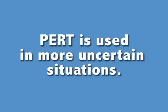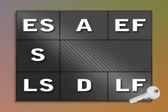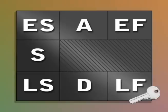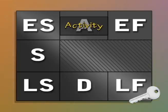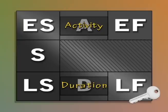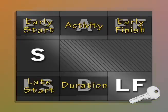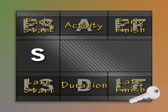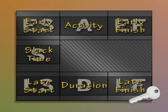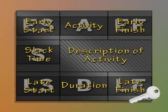We're going to start with the Critical Path Method since it is the simplest way. We're going to use a method that's a little different than in your book. We're going to use this key. In the center block, A represents activity, D represents duration, ES is early start, EF is early finish, LS is late start, and LF is late finish. Over here we have S which equals slack time. The block with diagonal lines is where you can write a description of the activity if you choose to do so.